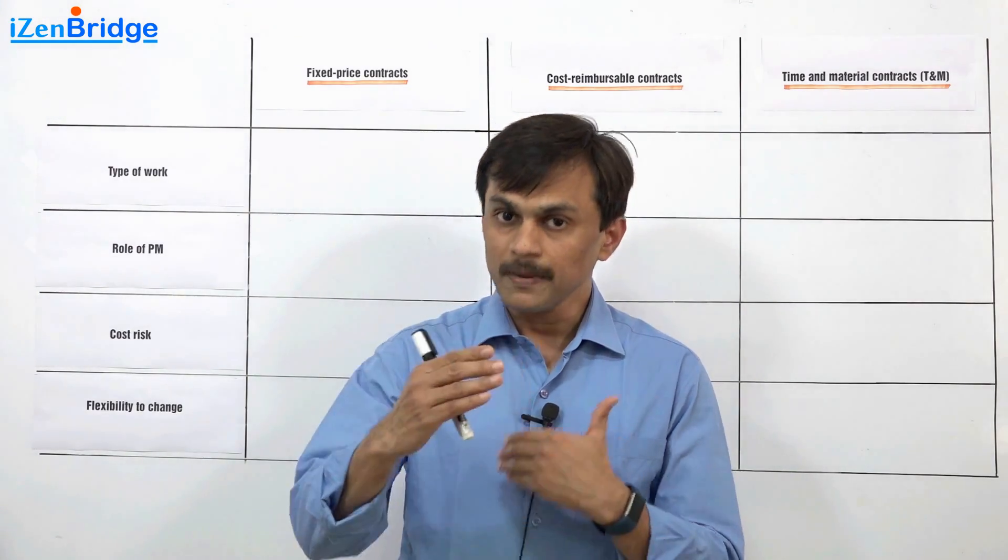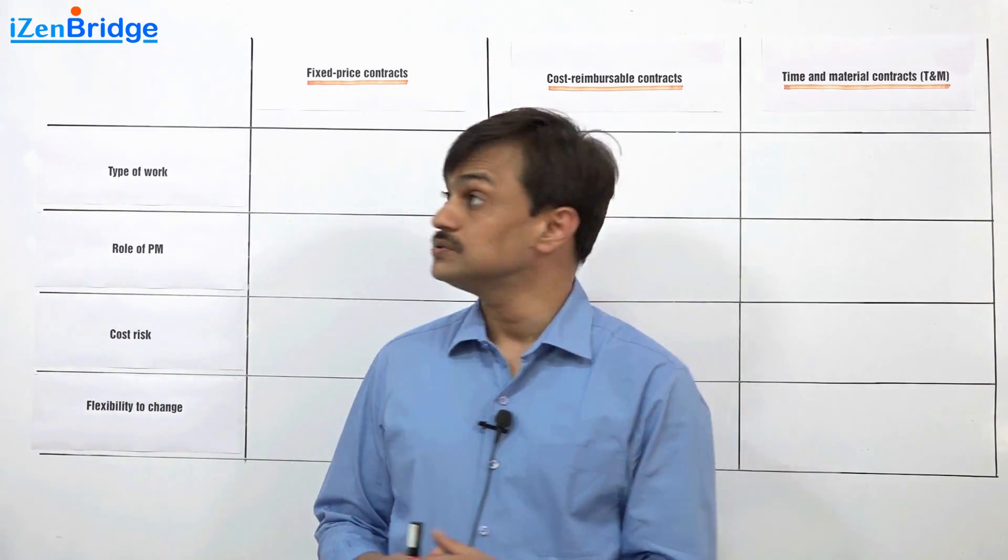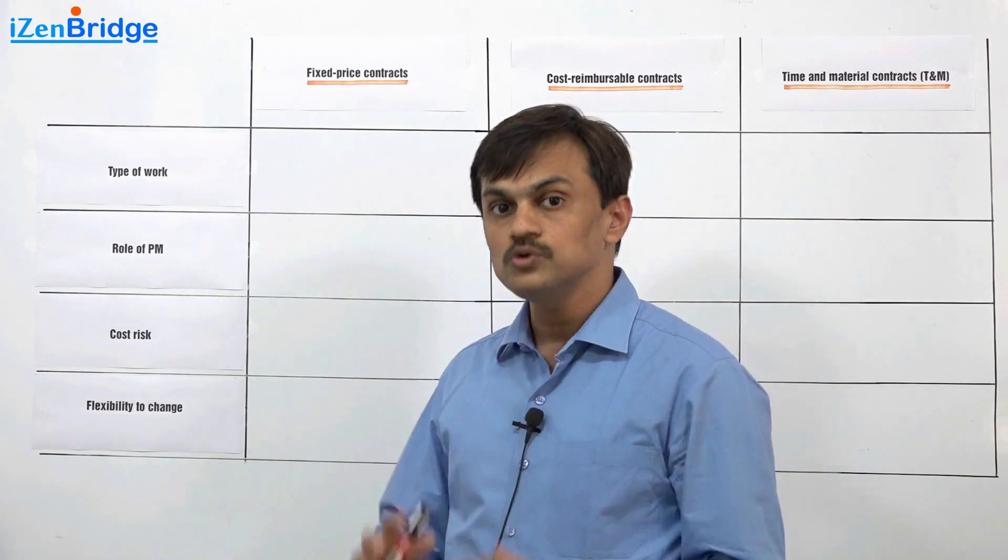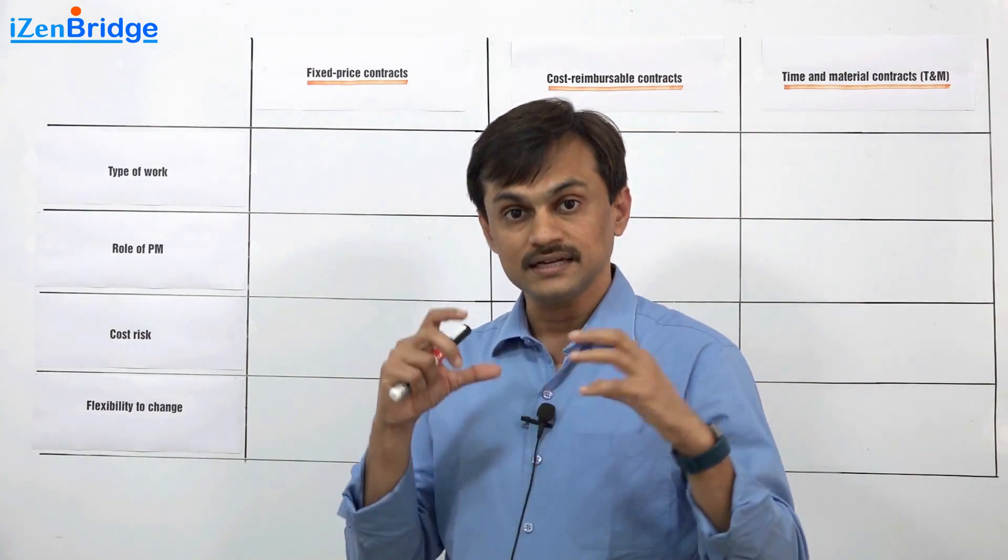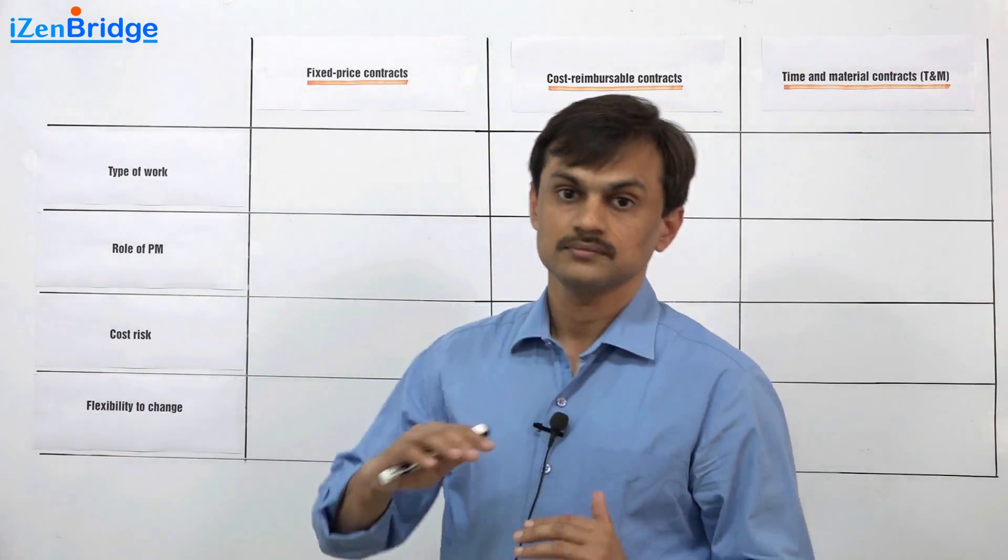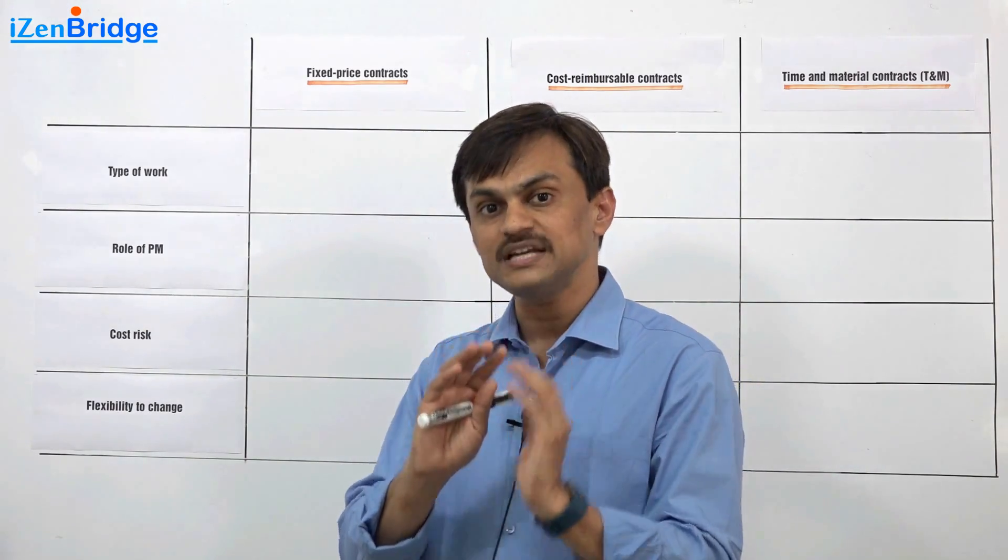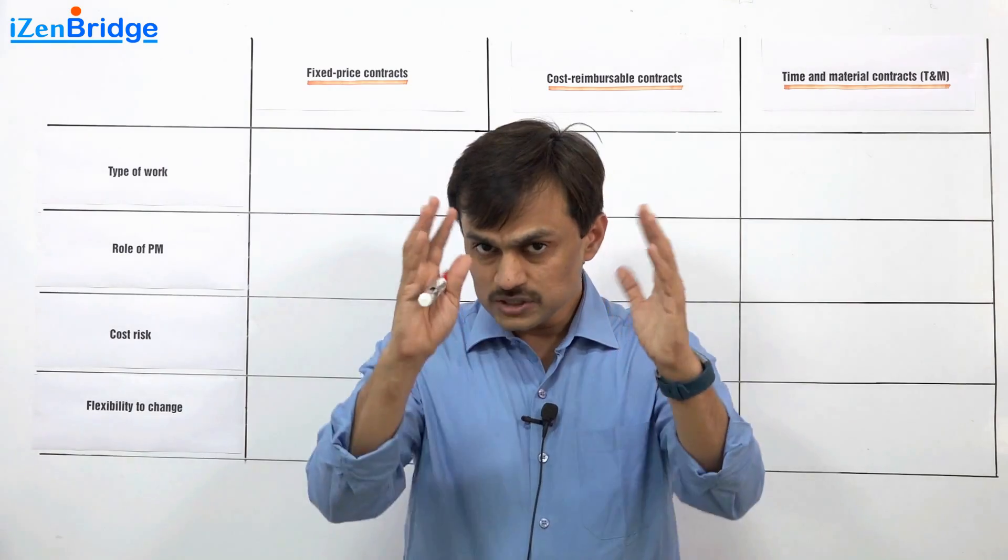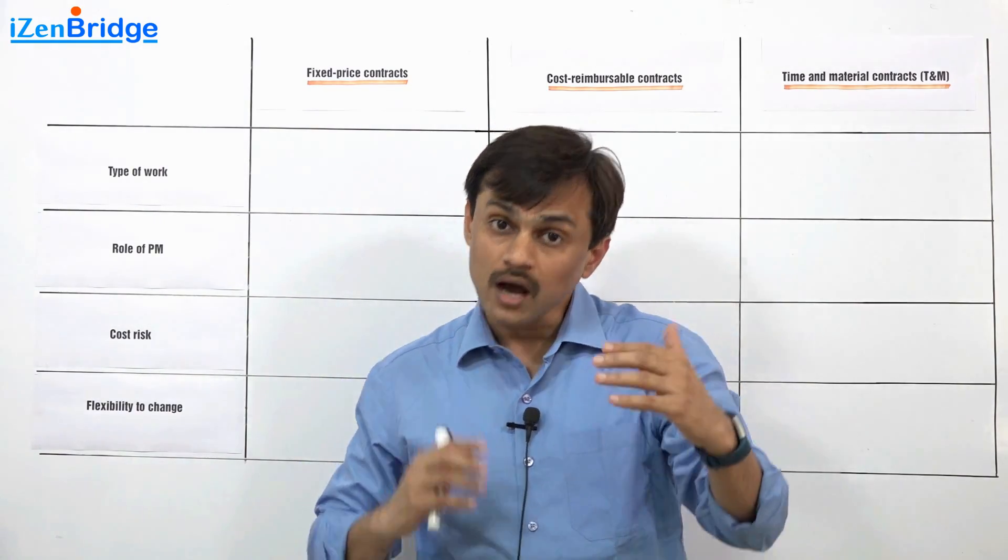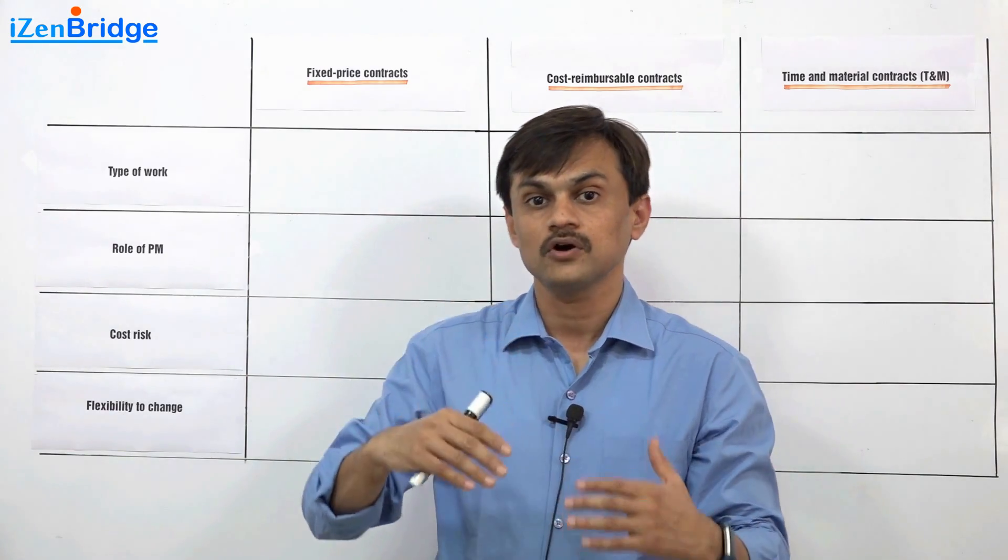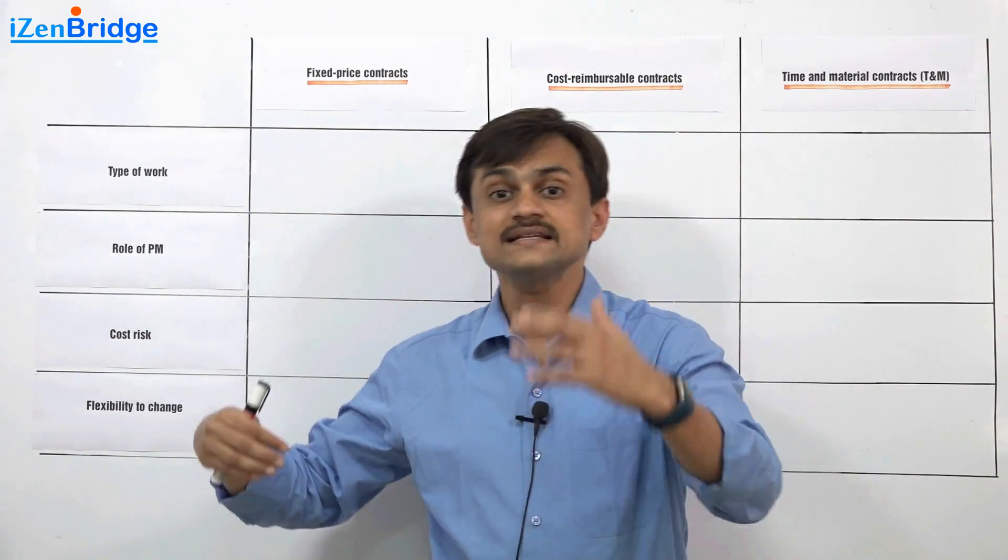Both buyer and seller can get into a fixed price contract where there is a fair amount of clarity in the type of work which has to be performed. Even the way of doing work, known hows, are also pretty much clear. Say I want to make something, so maybe the scope is clear first thing.